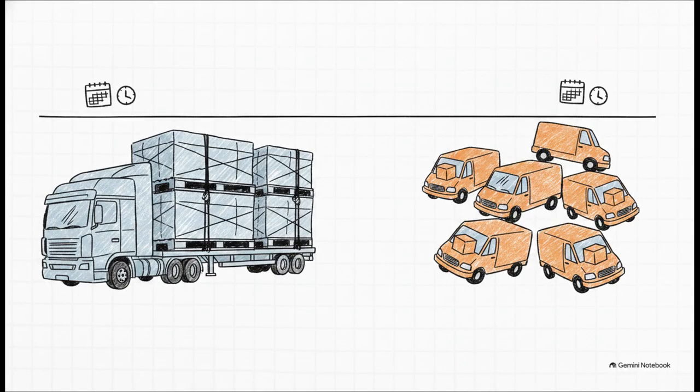But hey, it's not just about the supplier, it's about your ordering strategy too. For instance, buying larger batches usually drives down your unit price and saves on transport. Like your study guide points out, buying 2 batches of 5 pieces is almost always better than buying 5 batches of 2. Plus, knowing the dimensions, the production time, and whether something needs assembly after it's delivered, that's going to save you from some serious labor shortages down the road.